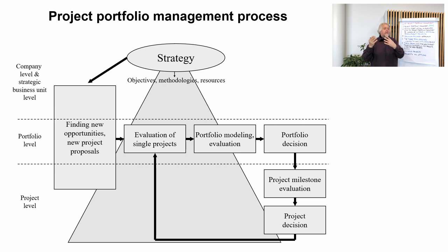Or even though very profitable projects are often also high-risk projects, so we cannot have all projects with high profit expectancy and high risk. We must also have other kinds of projects, which are lower or moderate profit and low risk projects, to ensure the cash flow of our company. Those might be, for example, justifications for killing even the most profitable projects, or projects that are among the most profitable ones.